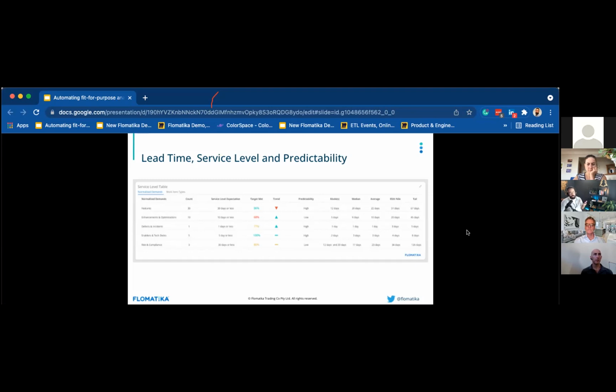And then we need to try to dumb it down until it becomes useful. You know what I mean? So at the end of the day, we end up translating predictability into things. Either it's high or it's low. And for that, we look at the ratio between tail and median to determine if the predictability is high or low.